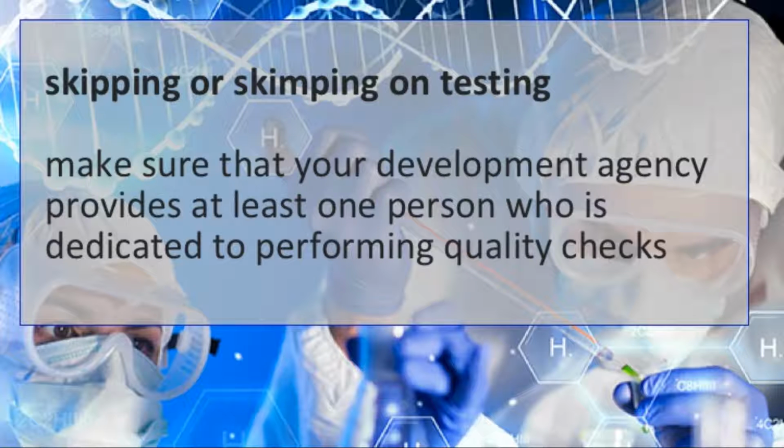They have to build out the rest of the application before they worry about every little detail of the first part, and then they go back and organically bring the whole application up to 90-95% functionality. That's when you have your QA team come in and focus on that really hard to identify final percentage, according to the specific needs of certain users.